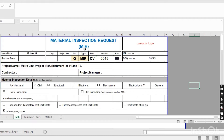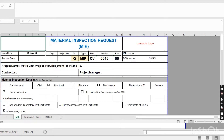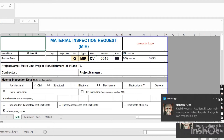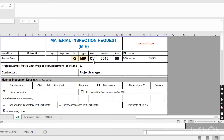This is the material inspection request MIR form. Here you have to put your contractor company logo, and here the consultant and client logo. There is an 'origin' field where you write the document number — this is mostly done by the document controller. You write the short name of your company, project fee purchase order number, division, quality, type of document (MIR), discipline, and this is the MIR number.